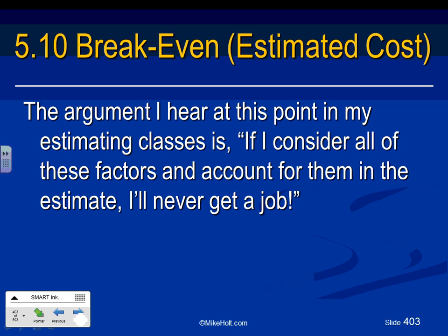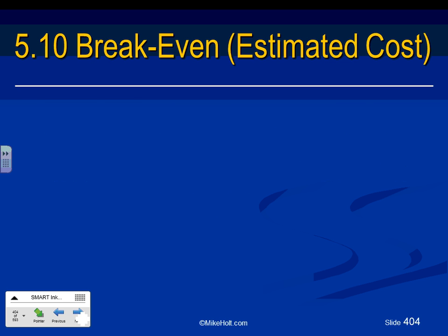So the idea, guys, is the break even cost will tell you that you will not go below this, because if you go below this, you're going to lose on this job. That's kind of the idea of having a break even. Break even, I covered everything. Should I run break even floating? If you're a small business, guys, and you paid all your expenses, including you as an owner and everybody else, and you did not make money for the company in a bad economy, that might not be bad. But ultimately, Brian, we're in business to make money and make profit. Our business is to make money and make profit.